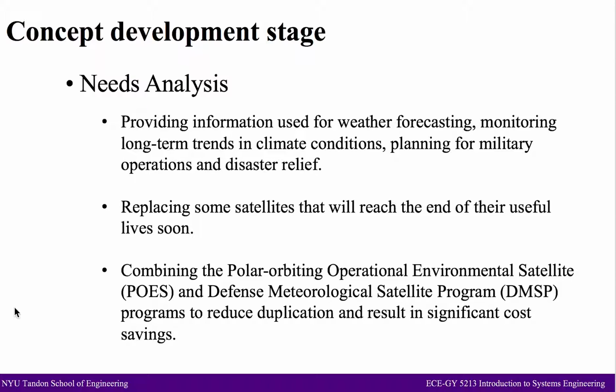Once the Department of Defense, the National Oceanic and Atmospheric Administration, that's NOAA, and NASA find that their satellite systems are reaching the end of their operational lives and ceasing to function at some level, they can launch new satellite systems to replace the old ones. To avoid discontinuities in system replacement, those three agencies need to store several more satellite systems awaiting launch, and meanwhile incubate new programs for the future.